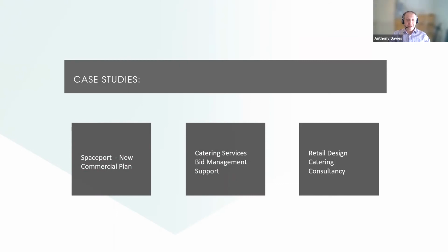Which is kind of big, and this project itself was looking at 3 initial stages. It was looking at a discovery phase where the local authority really wanted an initial options appraisal on what options they had to deliver this service, a definition phase in taking that preferred option and then developing that commercial model to the point of it being feasible, and then developing that through viability analysis to actually get to a stage gate where the public purse could say, yes, we want to go forward with this. So that's a really interesting one.